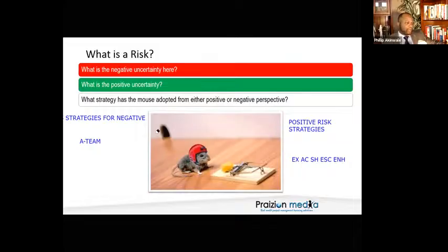I cannot handle this. Phil works in the firm, his leader works in the firm, and he tells his leader, look, I found this. Remember, it's a positive risk. I found this positive risk that could really help our organization, but I'm not qualified to deal with it. It is not enhance or transfer or accept. He tells his business unit leader, there you go, now you're talking. Do not forget that escalate is on both sides of the world, okay?